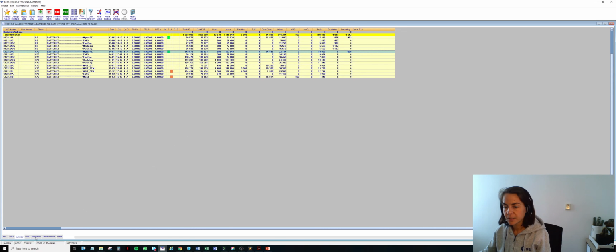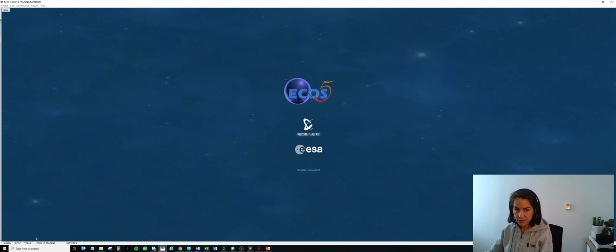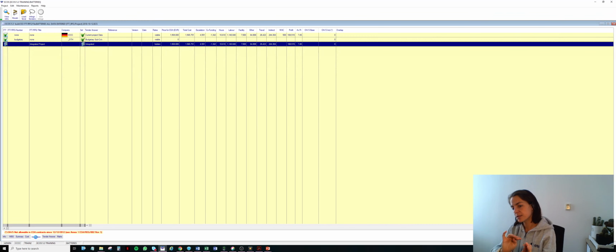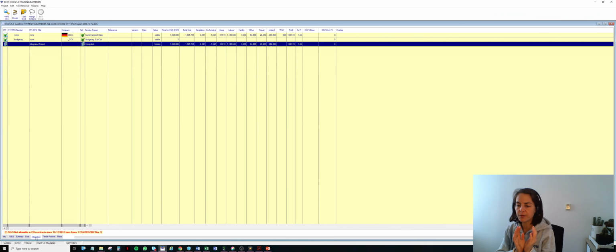Now, we can go into the integration tab, which is the tab after the cost tab. And if you follow, this goes in the right order. You see, first you have some information, then you build your PTWBS, enter the first set of information in the summary tab, enter the big part of your data entries in the cost tab, and then the next step now is to integrate.